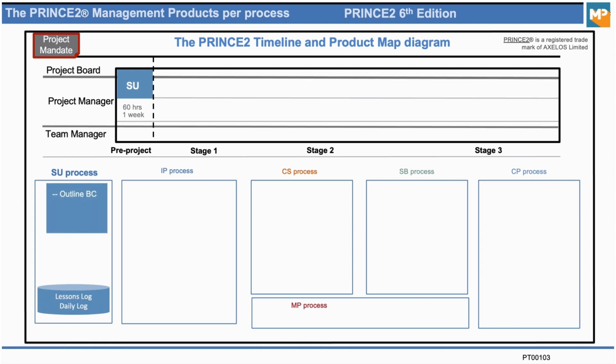Then they will ask the executive, that's the person responsible for the project, can you give me an overview on the business case of this project? And that's done by someone high up in the company because they understand how the company works and the value of this project from a business point of view. So that comes as the outline business case, a draft business case document, which the executive will be responsible for and write and make available to the project manager.